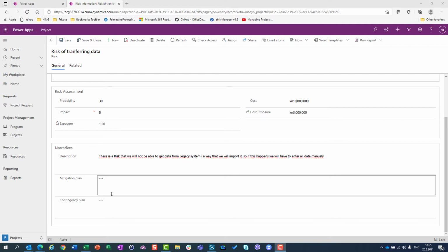So you don't even want to think about the tester being hurt, and you want to avoid it. You can cancel the testing, go to another area or another sea, let's say the Adriatic Sea where I live, where there are no sharks, or you can test it in a swimming pool. But avoiding means the risk will not happen.